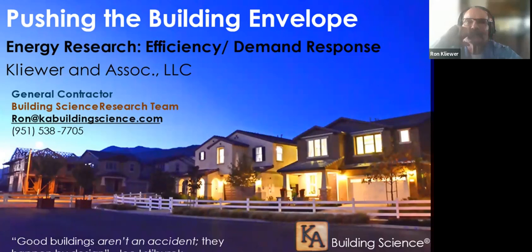Well, one thing that I found on some projects that we've done, even just recently, we brought the general contractor to the education center with the display, the smart home and the high performance wall and attic. And they brought all their subs in, and we spent a couple hours with them going through what we did with you right now, and answered any questions that the subs had before they started a project. And that was very helpful. That way they're all on board. They know why the builder wants to do what he's doing.